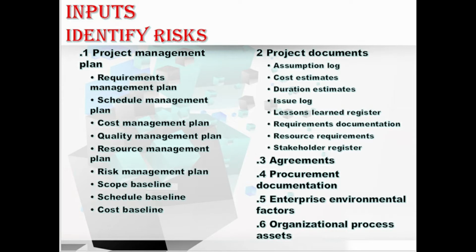Moving to the last, the cost baseline. The cost baseline may be reviewed to identify the cost or funding requirements that are subjected to uncertainty or ambiguity, or where the key assumptions have been made that might give rise to risk. Hope you understand all these plans of the project management plan, and their importance in the identify risk process. Let's move to the next input.